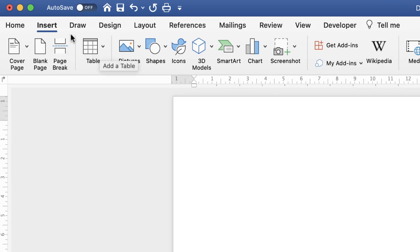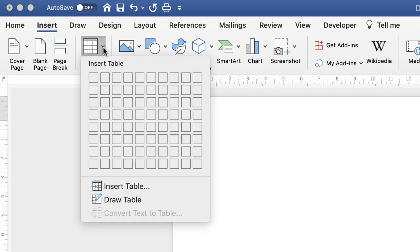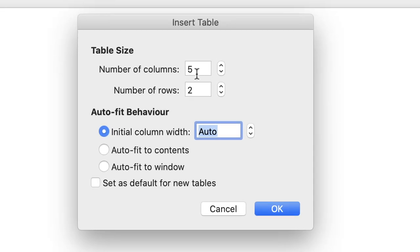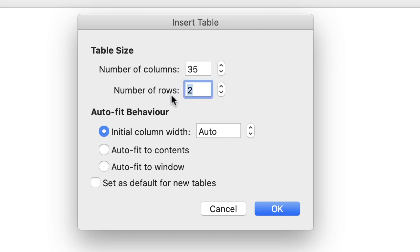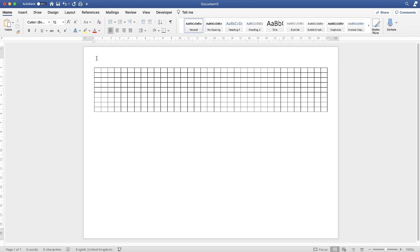Go up to the Table icon on the Insert tab, click on the drop-down. I can't select 31 columns from this grid, so I need to go down to Insert Table. I'm going to insert 35 columns — that will become clear shortly — and nine rows. You need to select as many rows as you see fit for your project; one row at the top is for the numbers, and each additional task gets its own row. Then click OK.